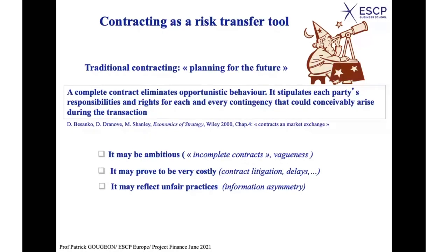And the facility manager will say, okay, no problem for that. And usually would provide you with a good price to make sure you get the market, okay? With a good price, and you are happy with it. Except that the facility manager, when he signs a contract, knows that there are lots of things which will have to be done, but which you as a client have not identified, okay? And that's the way he will make money.